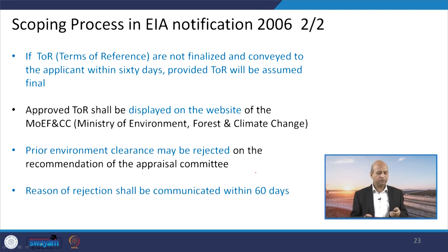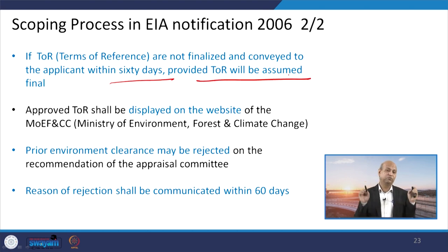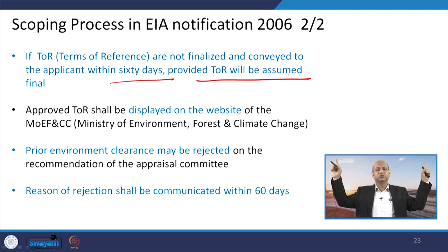Well, if TOR are not finalized and conveyed to the applicant within 60 days, the provided TOR will be assumed final. So, if no comments are received, that means whatever TOR you have submitted is fine and acceptable to the decision making body. Okay, that approved TOR shall be displayed on the website, so that everybody can see it.